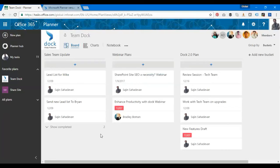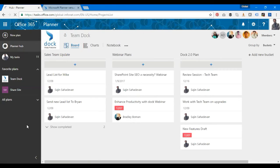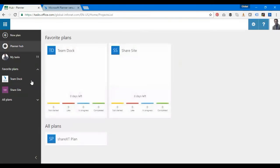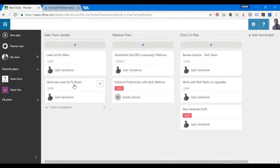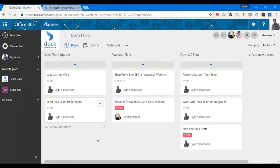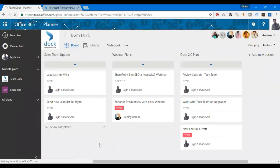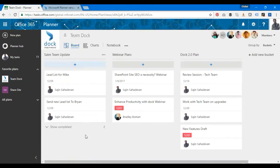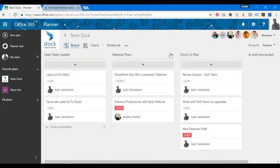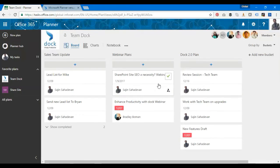That's about creating a task in Planner. Now what are the major components of Planner? The major areas are tasks, buckets, and boards. Tasks are the items I have over here. Buckets are the whole thing over here like Sales Team Update, Webinar Plans, Doc 2.0 Plan. Tasks are items of work or activities for an individual, similar to a task in Microsoft Project.